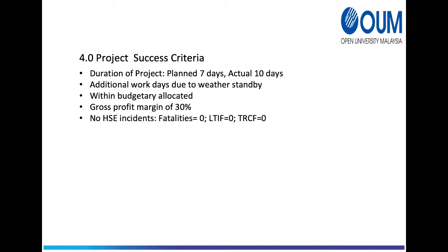The project was initially expected to be completed within 7 days. However, the project was completed in 10 days due to the unexpected risk, which was weather. These unexpected risks, such as weather, however, are mitigated through the contractual agreement, and standby due to weather is reimbursable. The project was completed within the budgetary allocated.